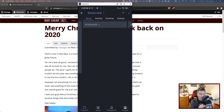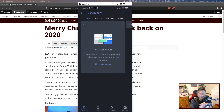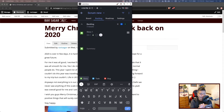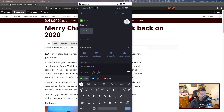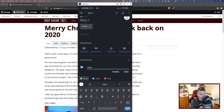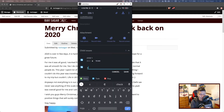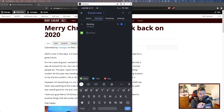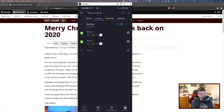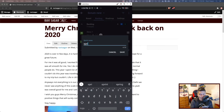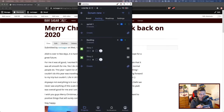The good thing is that you can create a project from the mobile app. In the beginning you don't really have anything, but you do have the option to take a look at the backlog, which is of course empty. Let me create story one and story two. If I go inside a story, I may want to create a subtask — there is an option here called 'child issues.' So child one, child two — this works fine. Can we start a new sprint from here? We do have the option to create a sprint — sprint one.